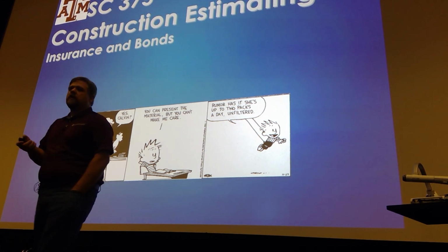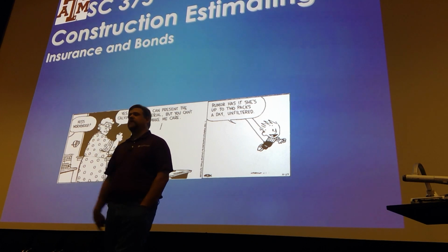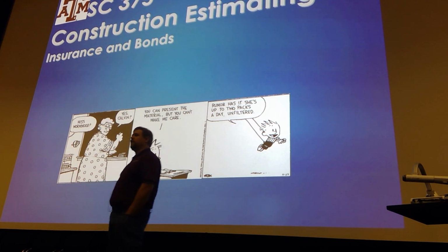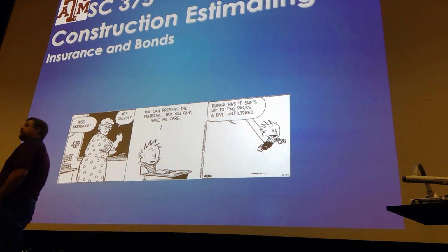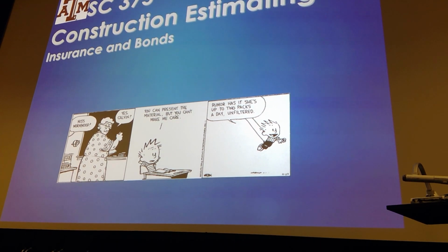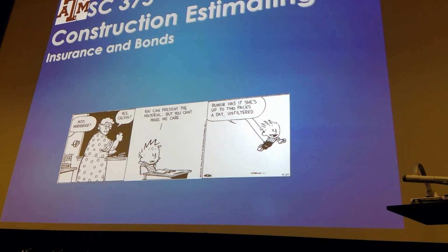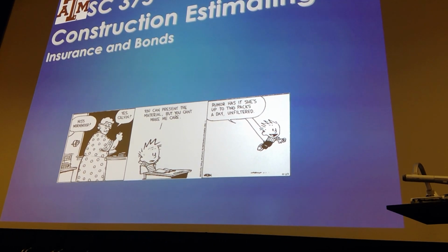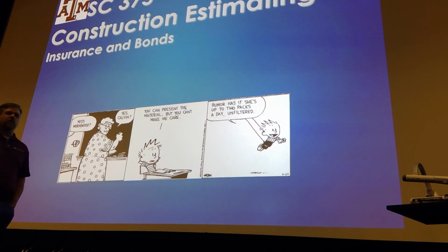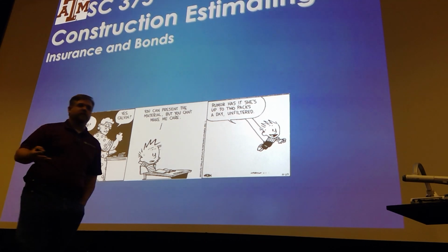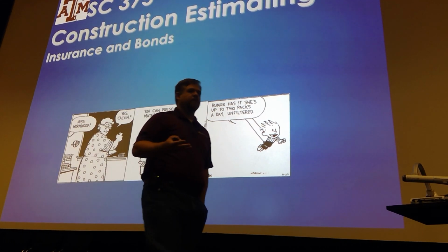Jake? Same assumption that if it's not excluded, then it's included? Yes, sir. Same assumption. So anybody didn't hear that? If it is not specifically excluded or in conflict with something else in their proposal, we're going to assume it's included. Okay? That said, I tried to draft these to where things were explicit. So I think you'll have less trouble with this. It's up to you and your test style whether you want to go straight to the bid tab or leave that to the last. It is worth 4 questions out of 40, so it's 10% of the exam.